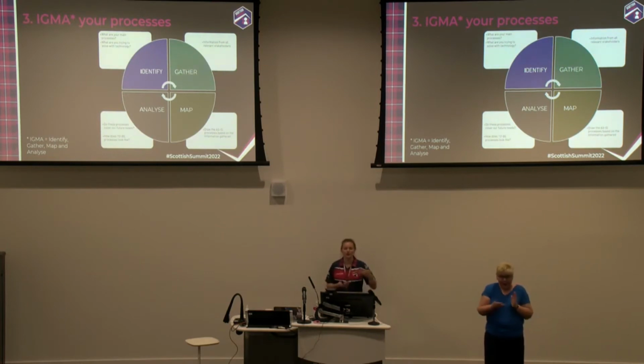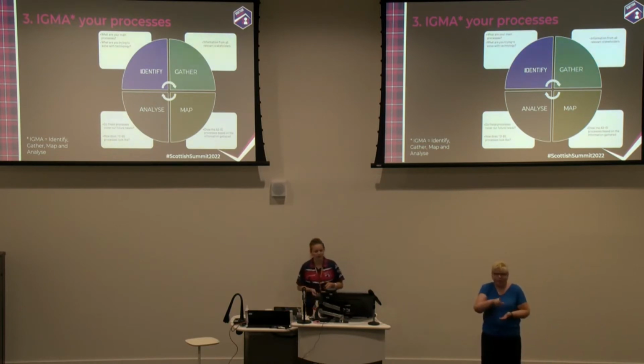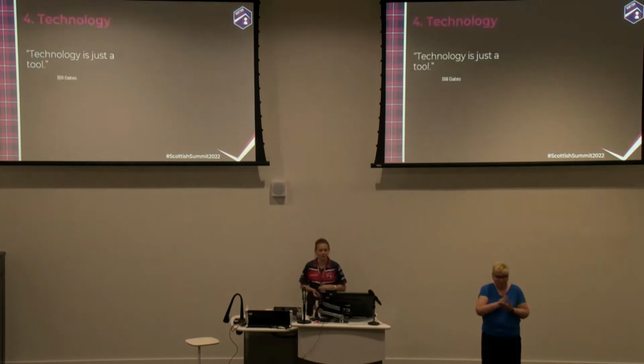They want new stuff, they want the new ways of doing things, but still, they are still hoping to base it on the old processes that they've created at some point. And that is why you have the analysis phase when you figure out if they cover the future needs and draw up the to-be processes. And in the end, you can compare and see how much the two differ from each other. And it is the analysis phase and it is the to-be processes that you're going to base in order to build the system that you want to do.